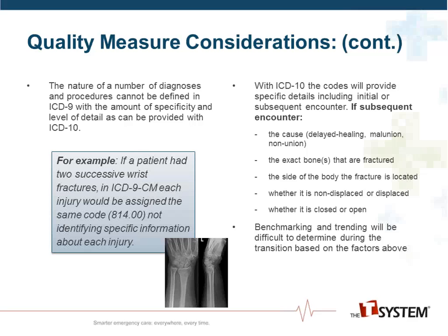Part of your ICD-10 project should include designating someone to provide ongoing CDI feedback to providers. This individual can be a coder or HIM professional. CDI feedback can be performed by coding today's production charts in ICD-10 and identifying missing data elements. Measuring that information is important so as to effectively communicate the need for better documentation to providers and provide a baseline for improvement. And now, here's Kathy Jennings, Manager of RevCycle Plus Education, to tell you about code set assessment and training.